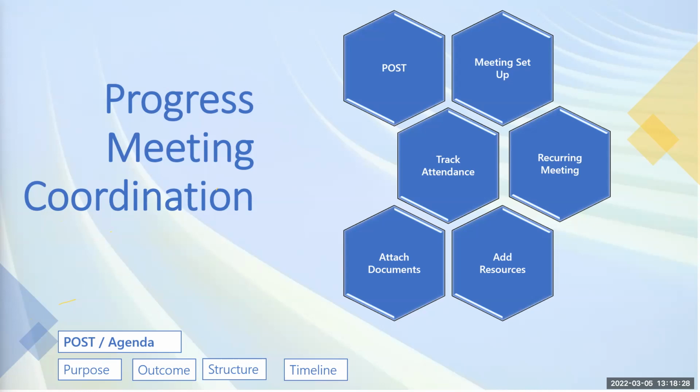So you check and see how many people have accepted this meeting, how many people have declined this meeting, how many people haven't responded at all. So that will help you to set expectations as well. And even the people that have accepted, you don't really need to do anything. But the people that haven't done anything, you can just send them an email saying, just checking if you'll be available for this meeting.